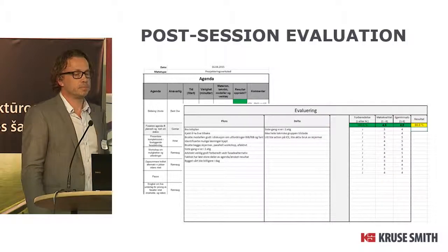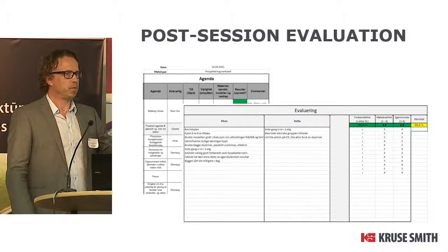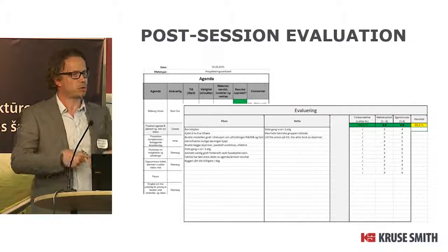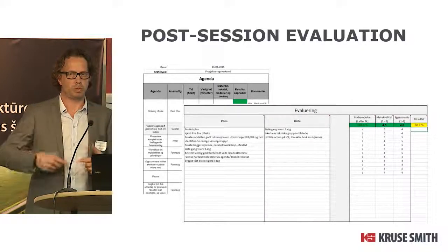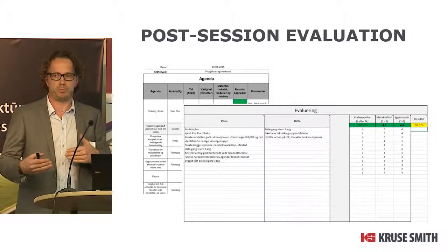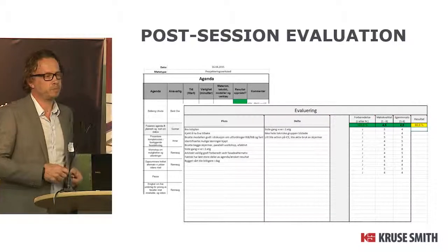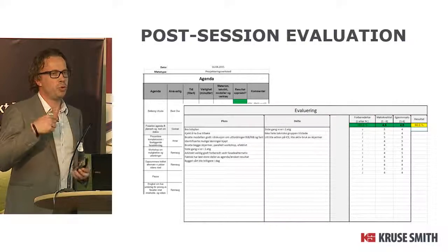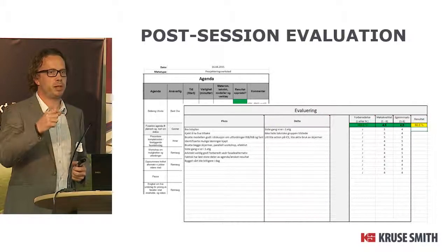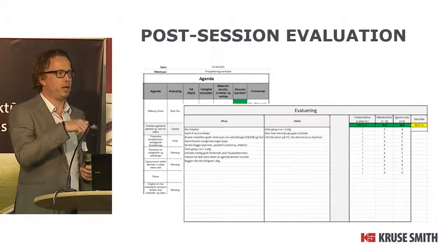After that, you do an evaluation where everybody in the ICE session is asked what was really working for you and what did not. What shall we do more of next time, and what shouldn't we do more of? The plus delta. And then we ask a question to everyone: in your opinion, do you think the other participants today were prepared for the meeting? That's the little trick I mentioned earlier.